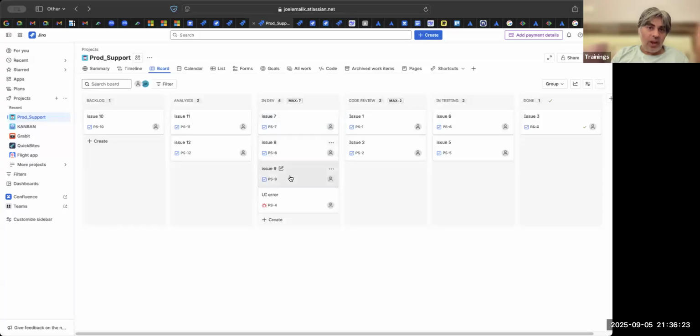If I have more here, then what is the point? In places where there is no WIP limit, you will see 8 tickets in code review and the tester will be roaming freely. Suddenly these code reviews get over, then suddenly the tester will be bombarded. The work is not flowing evenly or nicely.